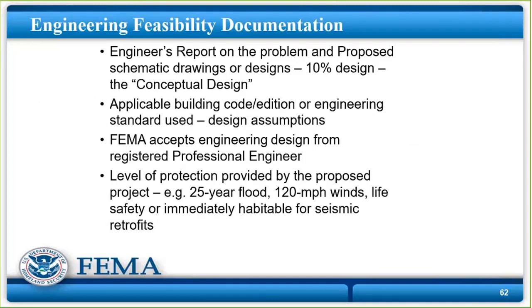So, engineering feasibility documentation. You need to know FEMA will require 10% design, conceptual design, whatever they call it, for any project that you want to build or a seismic retrofit. Not necessary for a flood elevation unless it's for a larger building, usually a public building. You'll need to tell them what the building code and engineering standards are. We do accept engineering designs from registered professional engineers. Our engineers are not going to go back through and redesign the building for you, okay?